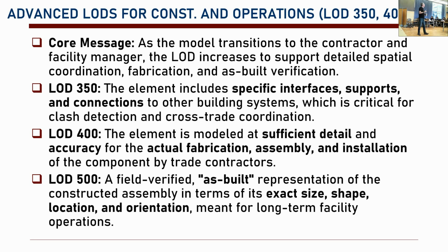So as-built verification, like, did you put a Casio projector? Yes. Well, like, what is the maintenance detail? Put that into LOD 500. Okay. How did you move the cables? Cables are on this beam. Okay. Put it in LOD 500. Okay. So you know how many holes did you put in the system on the wall? You want to know even about that. Okay. So these are all in LOD 500.